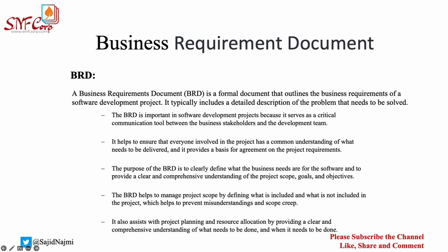Now, what is scope creep? We have discussed this a lot in the previous class, but let me give you one example. Scope creep is like frequently changing the requirement. Let's say a business has given you something, and now during the project, during the execution phase, business is asking you to add something, right? And business doesn't want to go through the change management process. So what will happen if you accept? This will be called a scope creep.